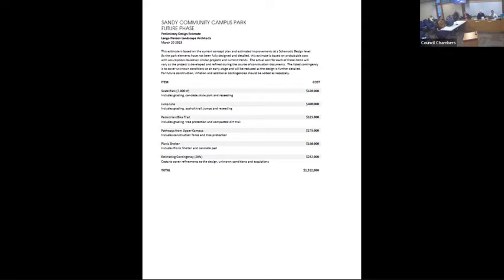One of the things that we've talked about up until this point is potential available funding. And we've talked about the $3 million that was left over in cash from the original purchase of the community campus site, and then SDCs. And currently we had about $2 million in SDCs. So available funding for this project would have been for hard and soft costs, about $5 million, and thinking 4.5 million for construction possibly. And so this number right now is preliminary.